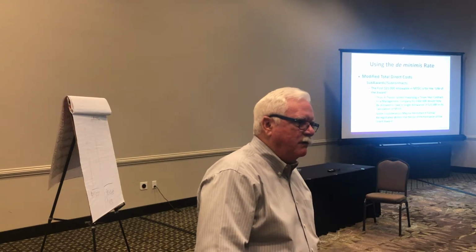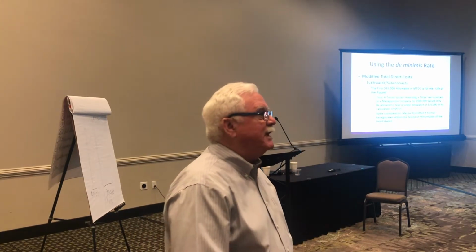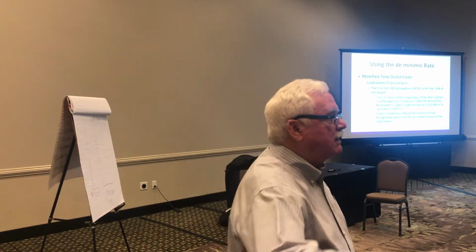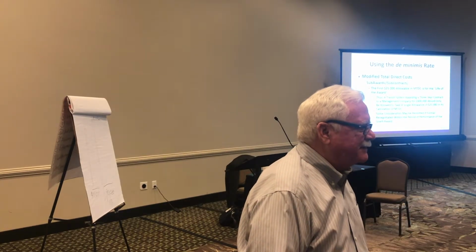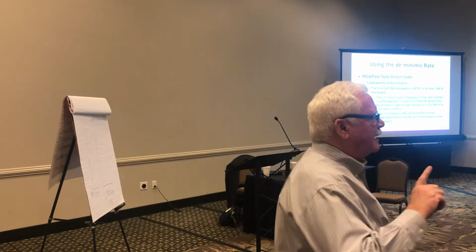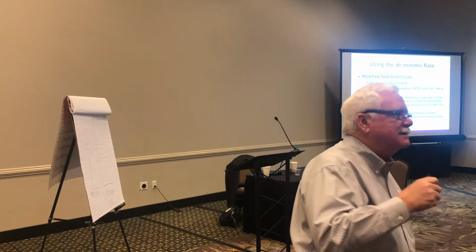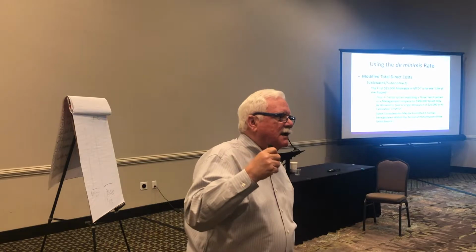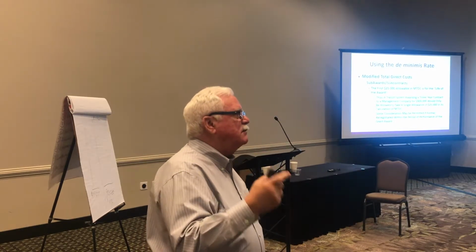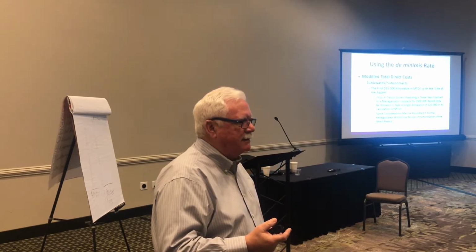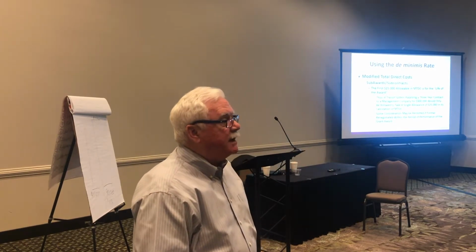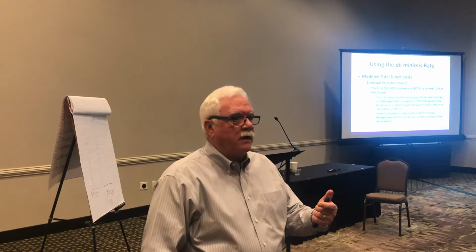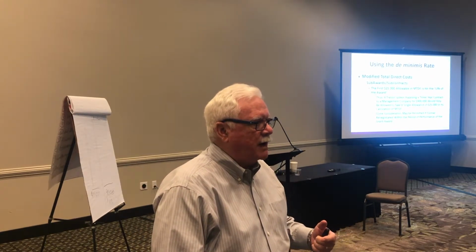Now you may say, well, I can beat that limitation by merely signing a 1-year contract with Transitions. And that might make sense initially. I highly recommend that you not do that, because Transitions will look at the RFP and say, they're only offering me a 1-year contract.